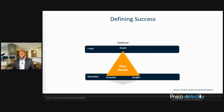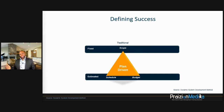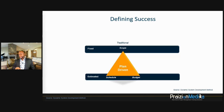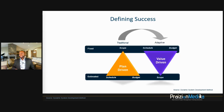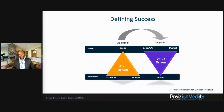There are two ways to look at project management. From the traditional lens, scope is fixed while schedule and budget are estimated. Then there's the world of agile, where we flip this triangle on its head: scope is flexible or estimated, and schedule and budget are fixed.